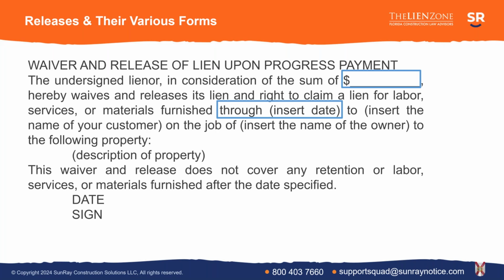The other rights that you have, such as your contract rights to get paid, are not being released when you sign a statutory lien release. Also remember, that's true when you get a statutory lien release. If you pay someone a check and they give you a statutory lien release, the only rights that they're giving up are their statutory lien rights.